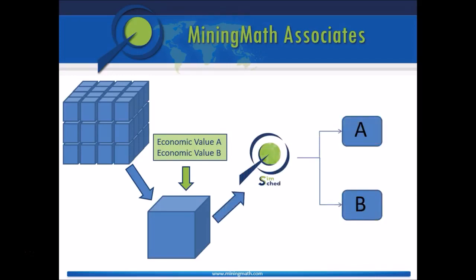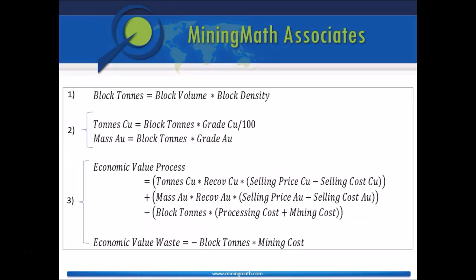Then, SimSched will decide based on these values whether and where each block should be processed, discarded, or stockpiled, choosing the one that contributes to maximize the NPV of the project, given all the interrelated constraints from the scheduling optimization. In the case of SimSched Direct Block Scheduler.